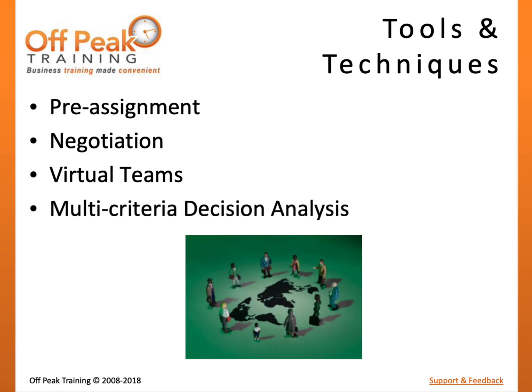Finally, multi-criteria decision analysis is a technique used to score potential project resources based on experience, cost, availability, skill, or knowledge. A weighting system can be used to evaluate the most important factors for resource assignment.